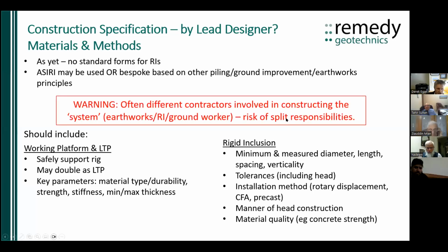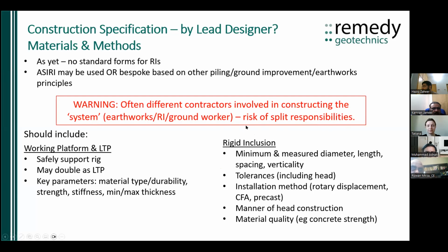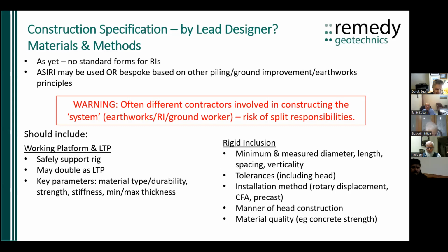That just covers the conclusion today. Now, this is where the big risks are, I think, with this system. It's often different contractors, or it could be different designers involved in constructing the system. So you do have this big risk of split responsibilities, and that has to be managed. And the best person to manage that is somebody who's probably higher up in their organizational chain than the specialist contractor.